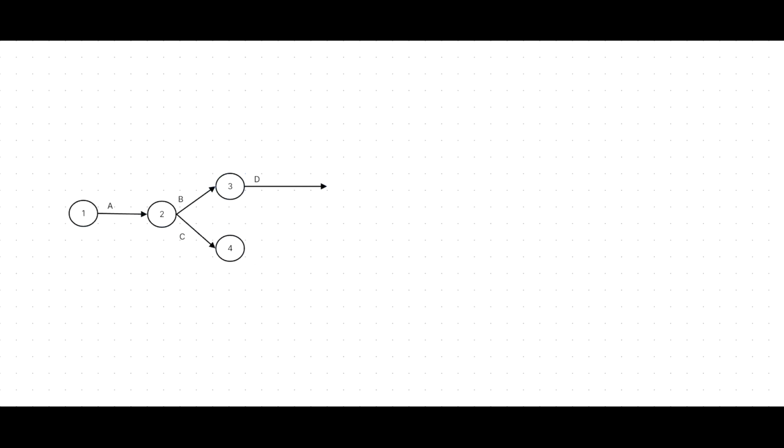Yes, I draw the E at the end of the D. Why? Finally, we don't have any activity after that. Finally, we need to complete all using another event. Sorry, another one we have, F. If we want to start F, we should complete D and E. Now, what happened?